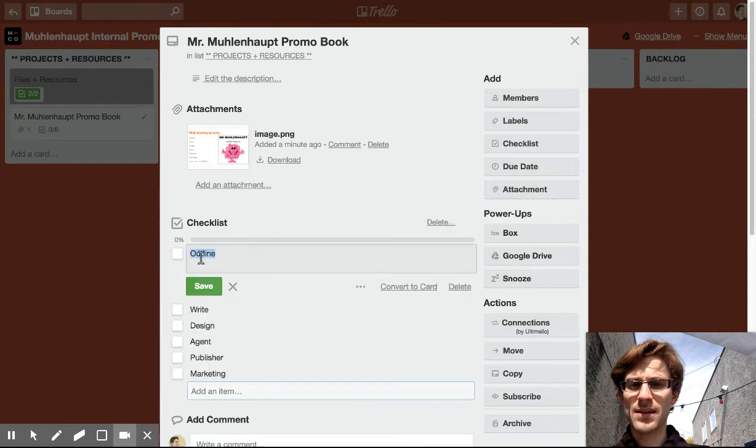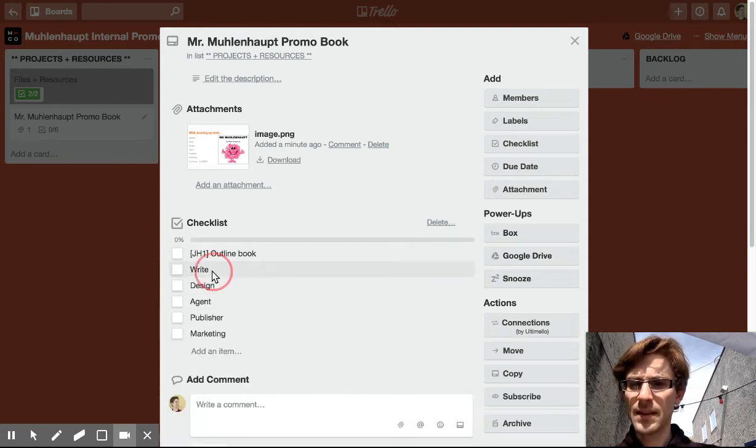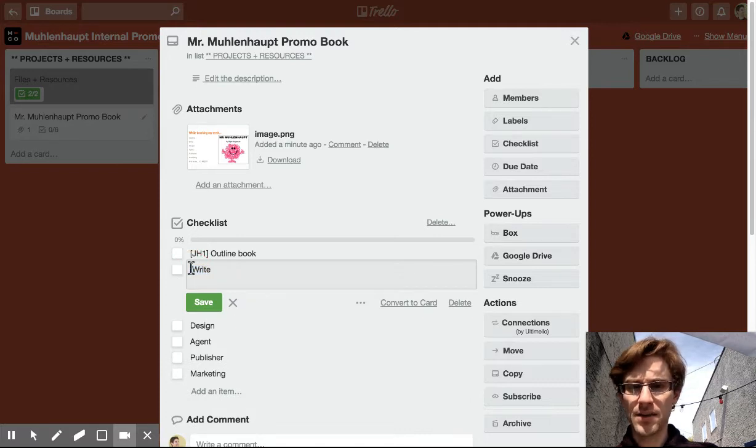Okay, so outline. So who's going to have to outline this? I guess that's going to be Jane. We're going to give her an hour to outline this book. Then the person who's going to write it is also going to be Jane. We'll give her 3 hours to write that.